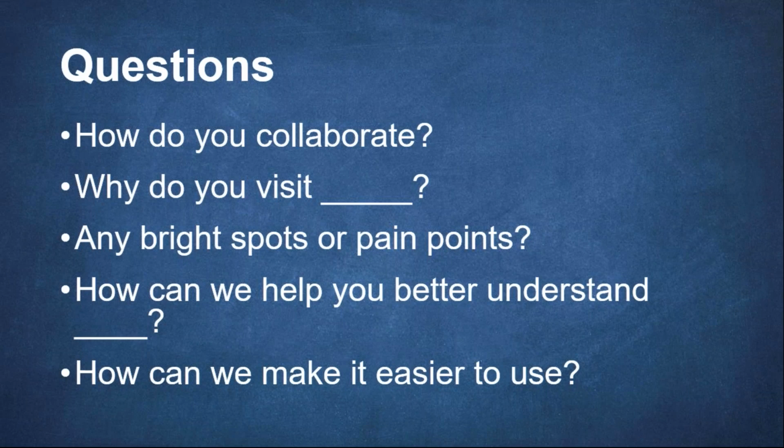One area that I want to highlight is the third bullet point, bright spots. It's easy to come up with pain points, but we also want to understand if there are any areas or processes that we can emulate, use as a guide for our design, so that we're not dismissing any initiatives when they reorganized a folder structure or something like that. You'd be surprised at how hard it is for some people to find something positive to say about a system. It's easy to list out the pain points. But when they can list out the positives that we can emulate, it's incredibly useful.